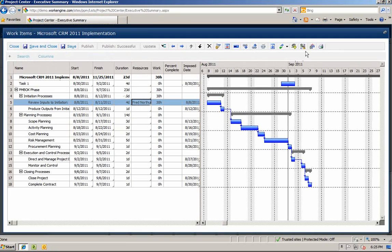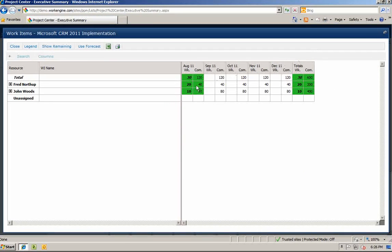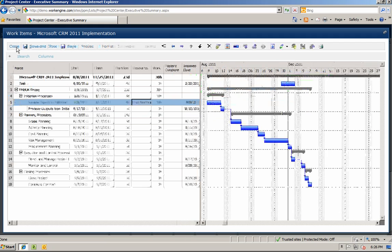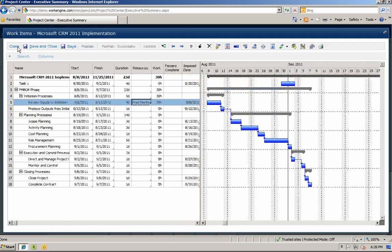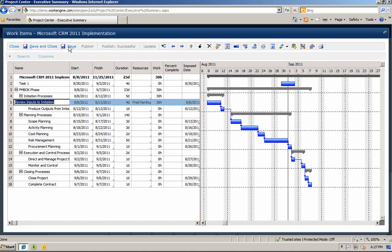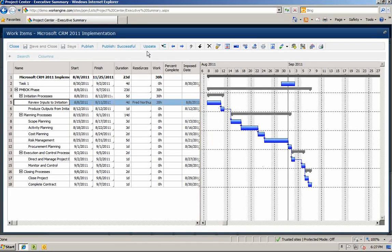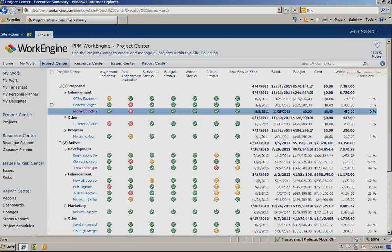Another powerful capability of the work planner is the ability to compare your work plan resource load to the resource capacity plan. Managers can now see the hours allocated versus the hours committed to ensure all resources are within alignment. Now that we have built the work plan and assigned resources, you can publish the tasks to SharePoint so team members can view and update their status. Once a team member makes a change, you can click the Update button and review all changes before accepting them back into your work plan.